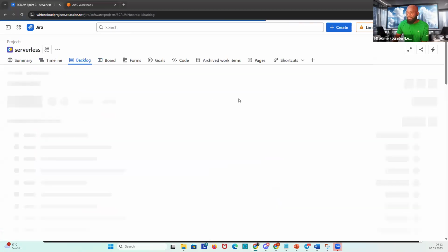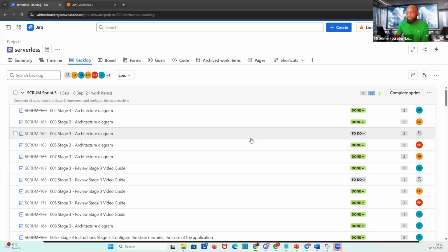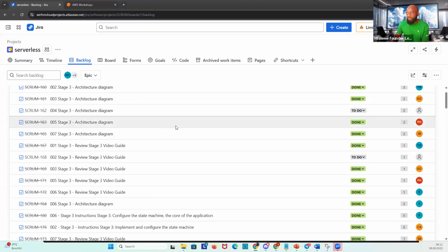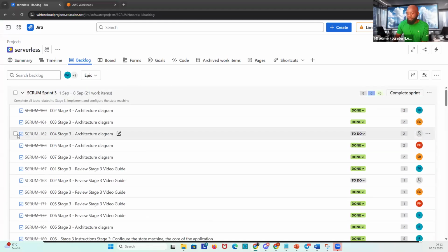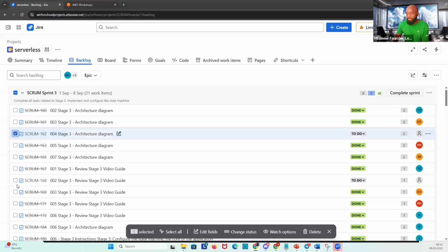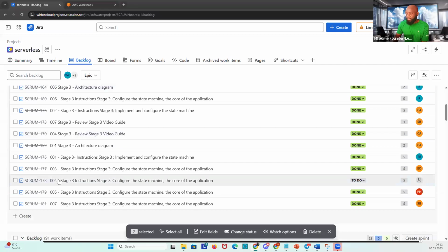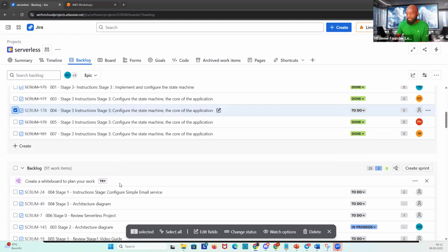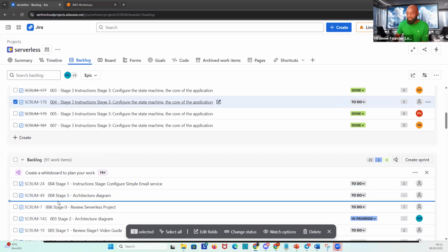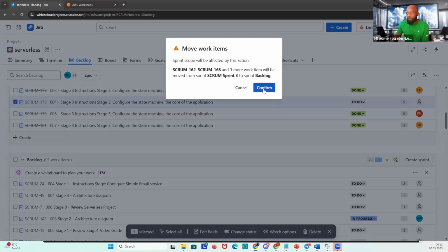It's not good to carry leftover work and close a sprint, so we have to send it back to the backlog as work that was not completed. And if it needs to be prioritized and we complete it again, then that will come later. So these are the remaining tickets which are surely to be done by Cynthia.